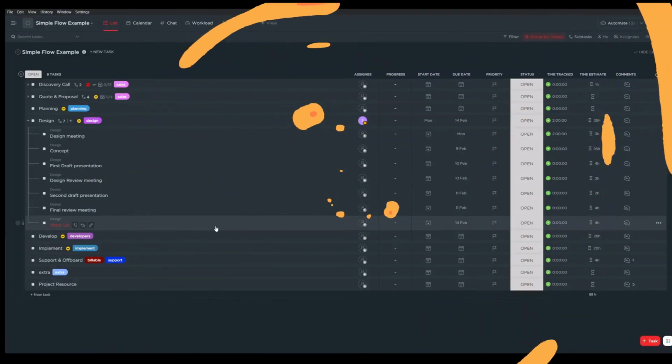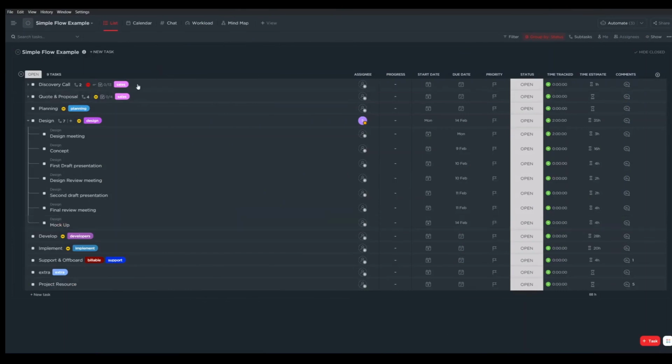So what happened here is you have a project, then a workflow within the project, with tasks and subtasks. Out of that, you decided to take a task and subcontract it. You have given guest access to a subcontractor and defined the rules by which they update this task from their guest account.